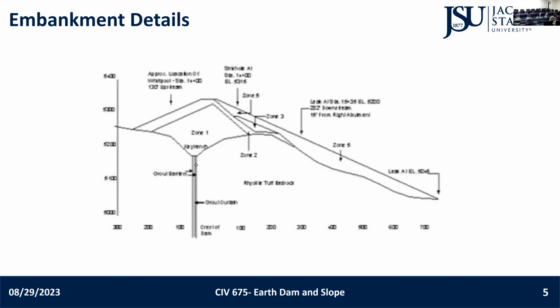That's why they built the whole system in one go, and there was a huge problem. They sacrificed the quality. And when they fill it up, they are supposed to fill it up and monitor it, right? Exactly. They didn't do that too. In April it was good, but from April to June the scenario changed.